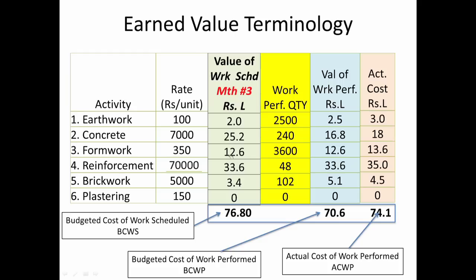Looking at the work package level, we can do a comparison and see which packages are affecting performance. At earthwork, we had scheduled only 2 but performed 2.5 — earthwork is doing better than planned. In concreting, 25.2 was scheduled but we are only at 16.8 — way behind schedule as far as concreting goes.